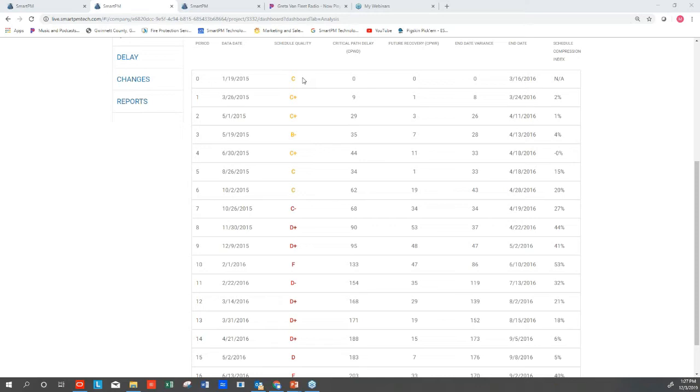And when that happens, we generally see a critical path that moves up the structure and then resides on the top floor of the building, which we all know isn't generally the critical path of the job. The critical path is through the trades, through the center of the building, unless there's some sort of enclosure delay going on. But nonetheless, that's why we want to look at quality. We want to look at it systematically.